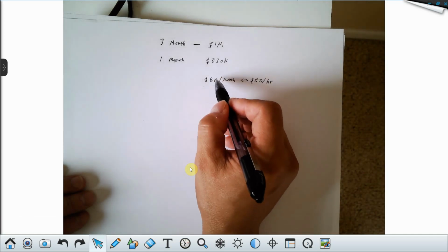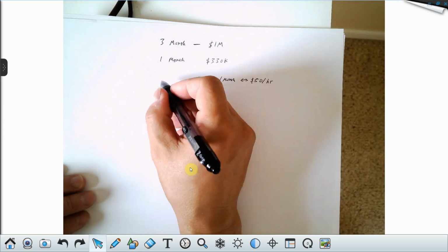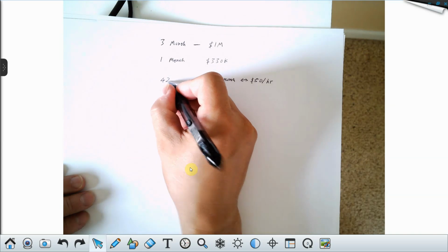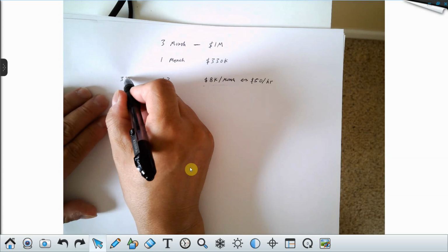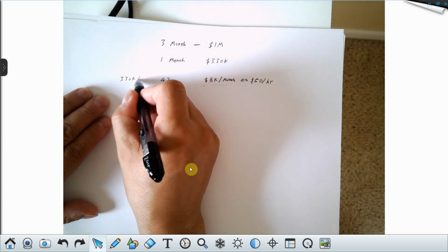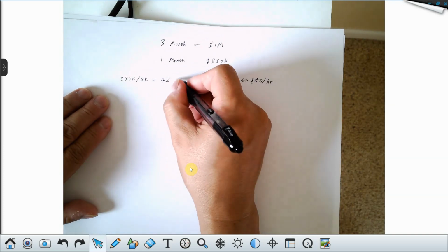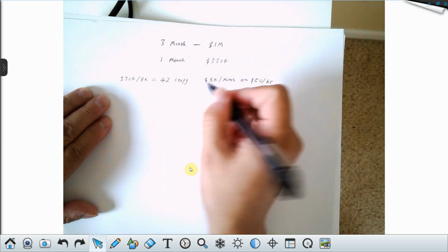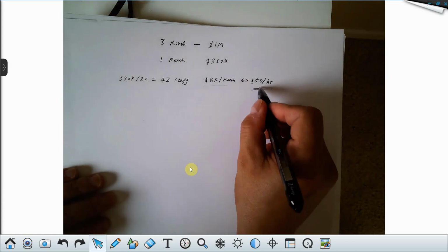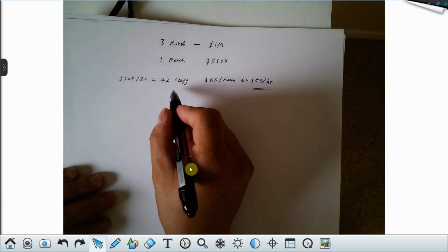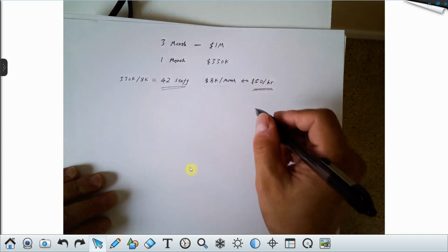If everyone is 8,000, then how many people do you have on your team? You need 42 engineers. How I get 42 is 300k divided by 8k, which is about 42 staff. In other words, if your average hourly rate is $50, you need 42 team members.